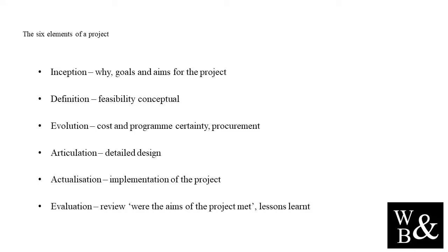To complete this element and move on to articulation, we need to implement the information gathering strategy, refine the concept, refine the whole project budget, update the health, safety, environmental and project risk register, update and close out assumptions on the assumptions and decisions register, secure project funding, develop a procurement strategy for the preceding elements of the projects if needed, and planning permission.